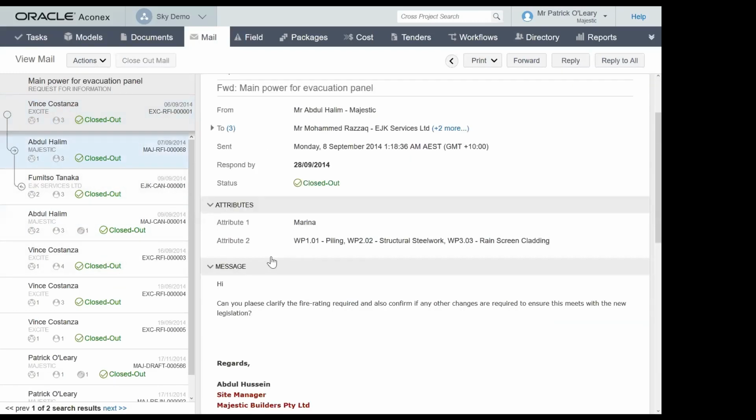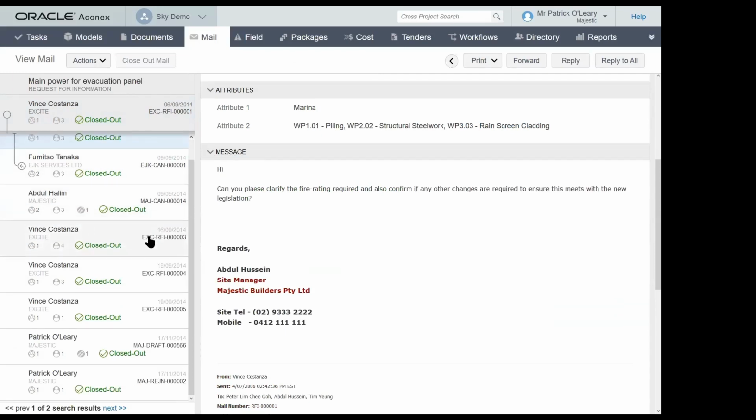All the various correspondences that happened in between, because this is actually what happens: a query comes out, the project manager says, okay, fine, can we get the specialist to answer this? You send it to the electrical consultant. He looks at this and says, okay, fine, we can make adjustments, but we don't have enough piping. So we need the mechanical guys to put in extra piping so that we can lay more cable. That is exactly what happens.